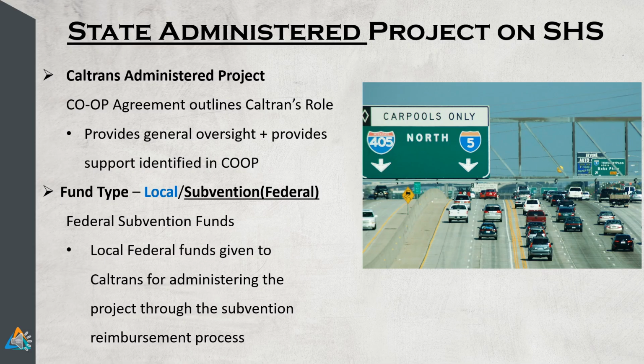Now let's talk about state-administered projects on the SHS. Caltrans staff does the design, PAED, advertisement, and construction. Subvention reimbursement is a process to reimburse the state for work performed by state forces on behalf of a local agency using the local agency federal funds.